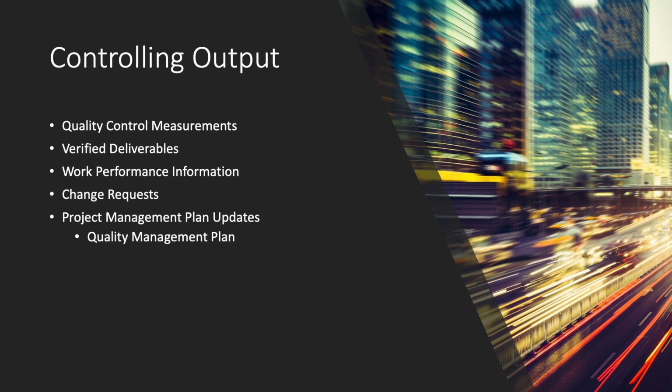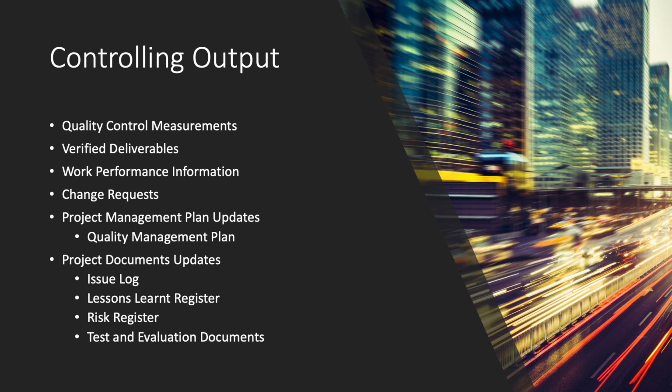Lastly, other document updates. Besides updating the project management plan, other documents such as lessons learned register, risk register, issue log, and the test and evaluation documents are also subject to changes due to the control quality process.